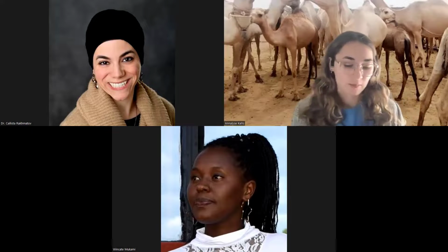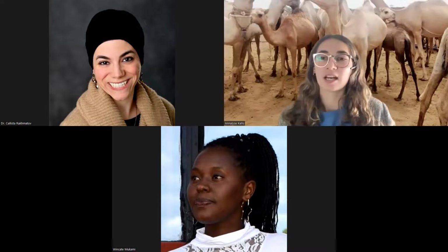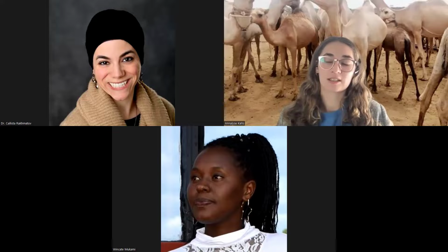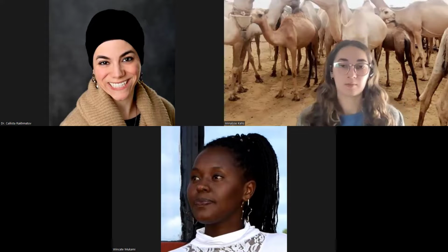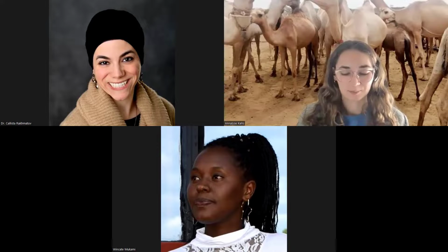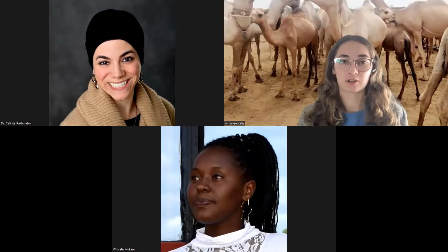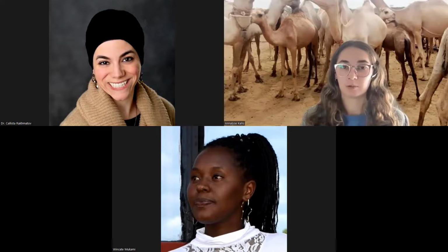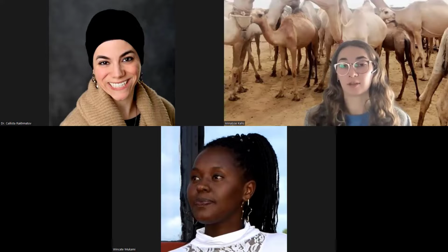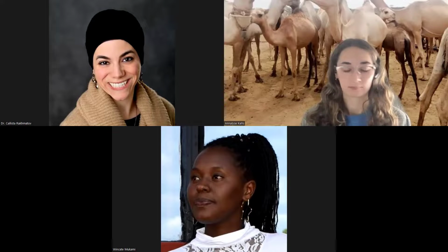And then from a rules and regulations standpoint, we have a wonderful administration assistant, Melissa Ishler, who is with us today, who stays on top of the invoices that are coming in from the subordinees and is able to answer all of their questions within 24 hours usually. So we're pretty on top of following up and staying very communicative with all our subordinees. And then logistically, as long as the budgets aren't changing, I think the rule is if you're changing less than 10% of where your budget is or where your spending allocation is, then you don't need prior approval from us. But otherwise, if you do need to change more than that, we will just ask for a simple write-up on why, what you're changing and where it's coming from, and that's usually sufficient. Thank you, Annalise.